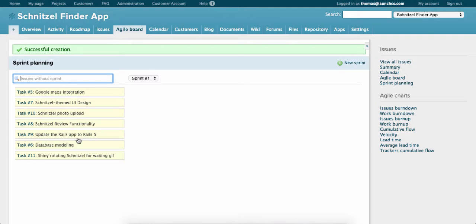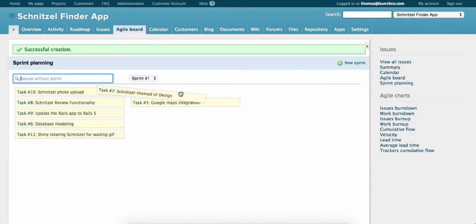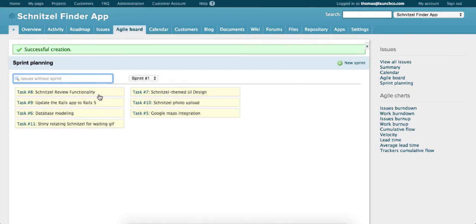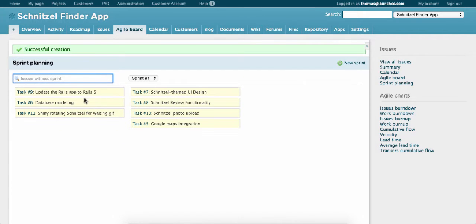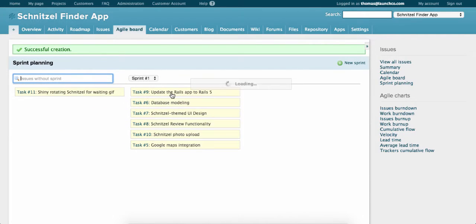Now you can drag and drop an issue from this column into the sprint you just created. Any items that aren't for this sprint can be left in this column.